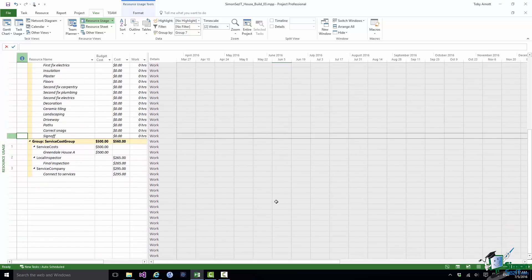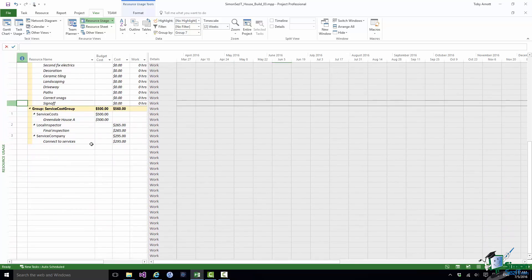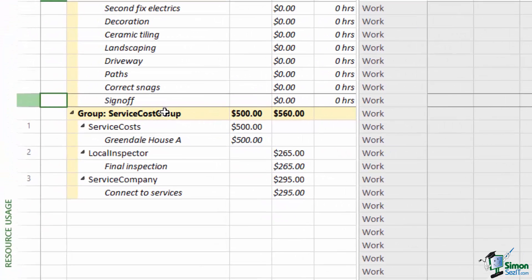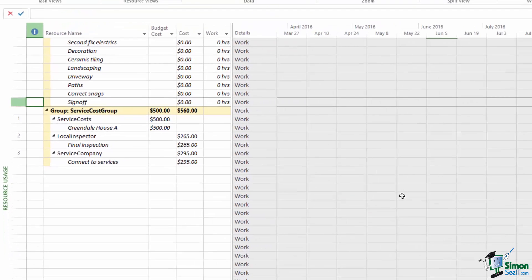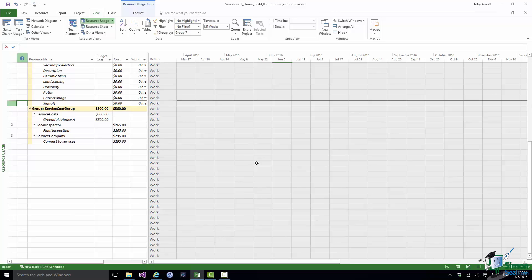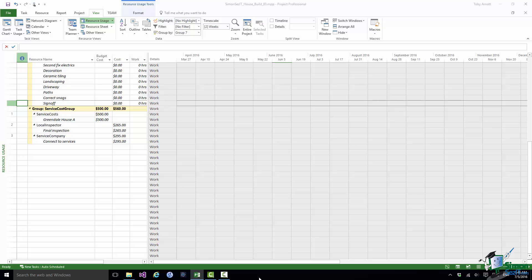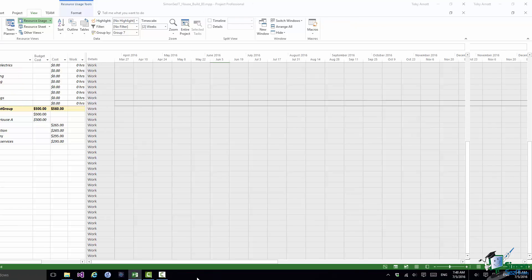What you can now see here for the group, Service Cost Group, the Budget Cost $500 and then we have the Actuals. We have the Final Inspection $265, Connect to Service $295. Apart from seeing that Budget Cost $500 you can see the two planned costs. Final Inspection $265, Connect to Service $295 and you can see that at present our Planned Spend in Service Cost Group exceeds the Budget by $60. So that gives us a very convenient way of comparing the budget for one or more categories with the planned and ultimately actual values in those categories as well. And we can apply the same principle to work.